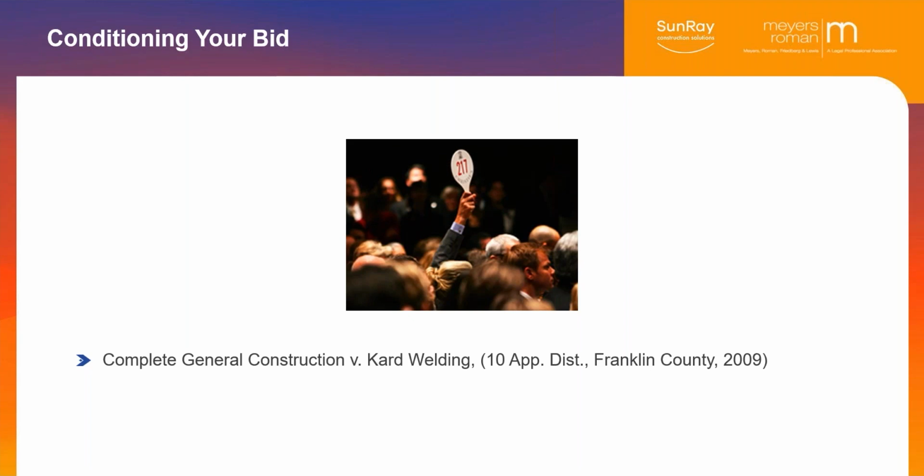It goes further. This case continues to talk about how it morphed from that first little fledgling one into what it is today, and what it is today is this concept that you can condition your bid. The things you don't use to condition the bid, they can stick you with. So be careful, but be sure you condition your bid, because conditioning your bid lets you negotiate.